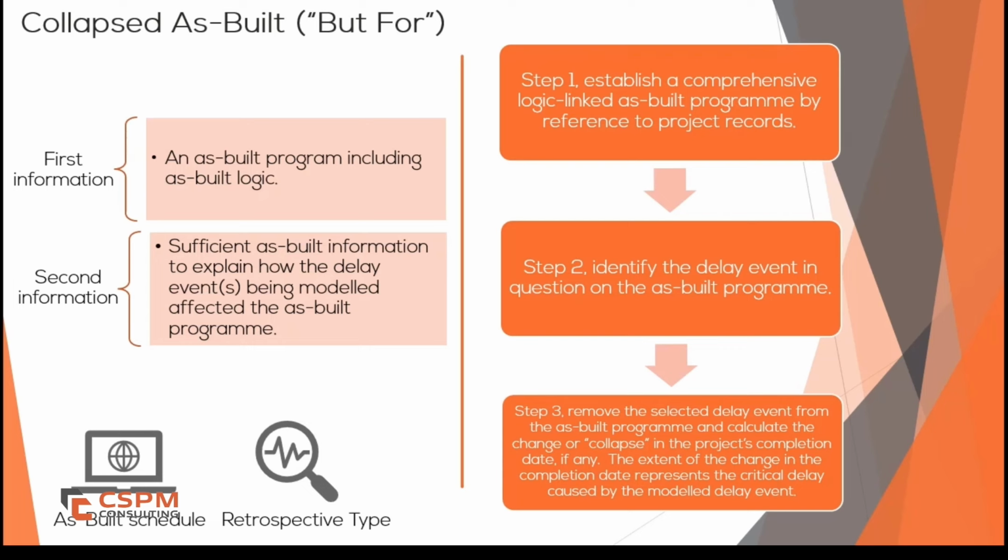What is collapsed as built? As the name suggests, collapsed as built starts with the actual progress recorded in the project's as-built schedule and then systematically removes identified delay events to assess their impact.